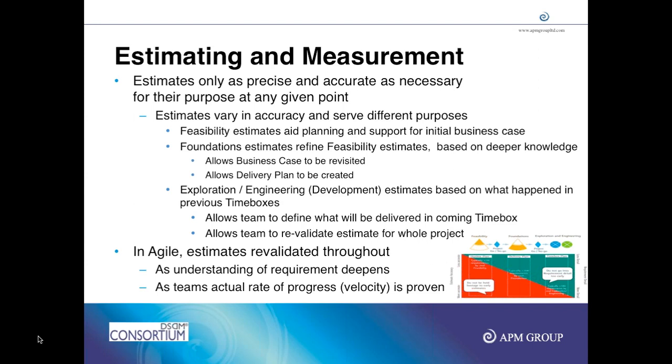Now, what I do is I go through all the 100 user stories that you gave me. For each story, I note down the lowest rating, the highest rating, and the average rating. Once I have rated all the stories, then at the 101st row of my Excel sheet, I use the sum formula and I sum the minimum story points, maximum story points, and average story points.